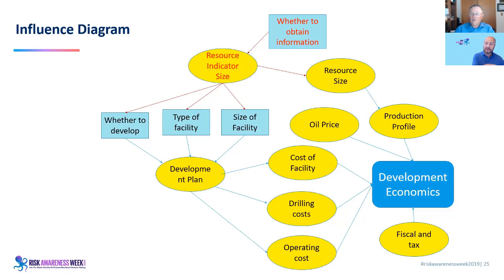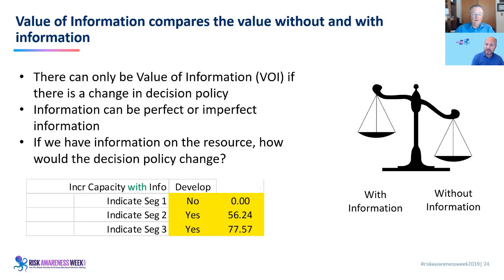So the previous example, just to highlight to everyone who's listening to us, and by the way, we always encourage you to ask questions, have communication, have conversations just between the participants as well as us. This is basically setting up some sort of ground rules for making a decision. If experts say X, then we're probably going to make a decision no. If experts say Y, then we will consider going ahead, but we will be more conservative in our approach. And if it goes into the third segment, the experts say yes, then we will have a bigger project, essentially. This is what this is saying.